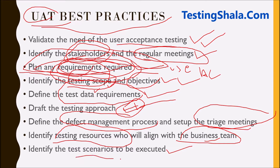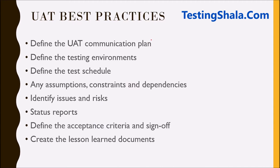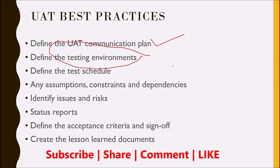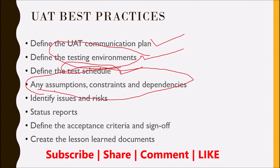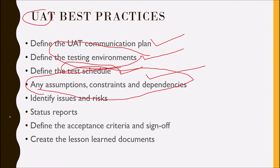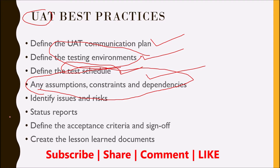The next thing we should look into is the test scenarios to be executed. We should also come up with the right communication plan — which we already discussed — to have regular connect with the stakeholders. We should define the test environments where UAT is going to be performed. We should also clearly define the test schedule. Additionally, we should document any assumptions, constraints, or dependencies for the business users or end users so that we can work on solving those issues.